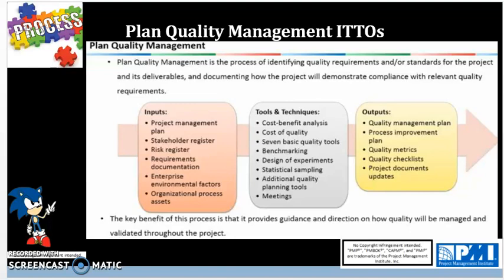Prevention costs consist of building a quality product, which consists of training, documenting processes, equipment, and time to do it right the first time. So these are examples of prevention costs. Next, we have appraisal costs, which are used to assess the quality, and this consists of testing, destructive testing loss, and inspection costs.